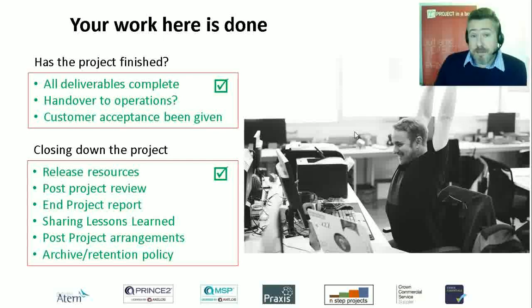And it's important to test that for the long-term viability of the organisation and the business, that it's doing projects that actually deliver what they are supposed to deliver. Now the project team will have been split up probably, and off doing other things by that point, but that responsibility should be passed on to the operations to assess that and identify whether that matched the original requirement, whether it was better, whether it was worse, because that's useful feedback for the next exercises and decisions that are made. So post-project arrangements like that, there will also be things that are in the risk and issue registers that you anticipated maybe still might happen, and they again should be passed on as well. That's useful insight for the people who are running the delivered project.